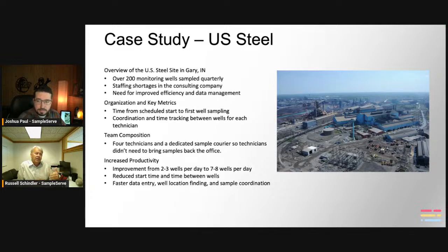And so what we went and did is using our software. One of the things that we measure is time, right? So we know exactly how many minutes it takes to sample a well. For that well, we track that. But importantly, tracking the time between wells is one of the key metrics that I've learned over time is where a lot of time is wasted, right?